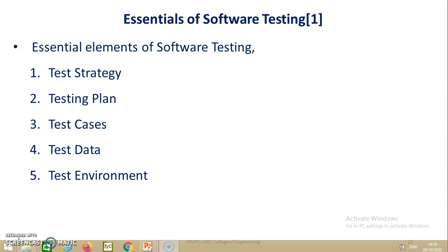Testing plan shows the dependency among the tasks to clearly create a critical path without surprises. We will be able to start filling in the details of our testing plan as soon as our test strategy is completed. So after we finalize the test strategy, then the testing plan will be designed. Both our test strategy and testing plan are subject to change as the project evolves. Modify our strategy first if you need to, and then the testing plan.